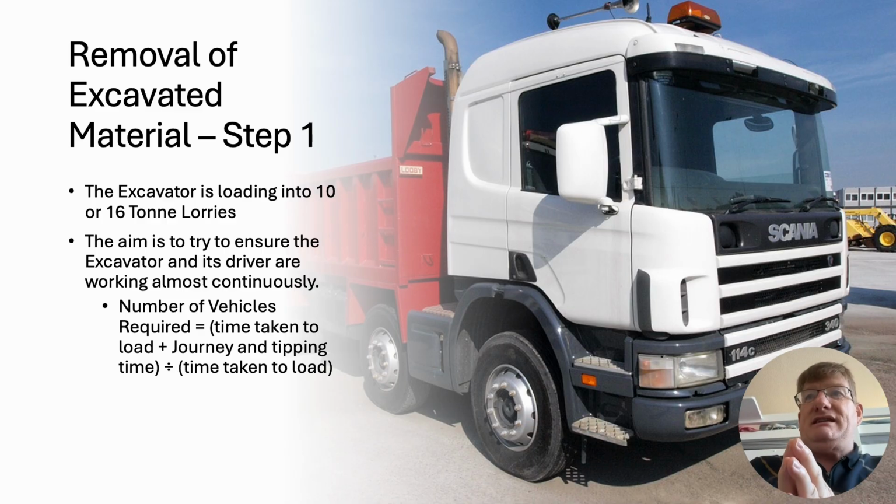What's the best for me to use, okay? So what we need to do is a time and motion study to keep those vehicles moving. We don't want them on stop. A site manager and a planning engineer will not want those lorries on stop. They're going to be on stop for a little bit, but they don't want them on stop for an hour because we're paying them.